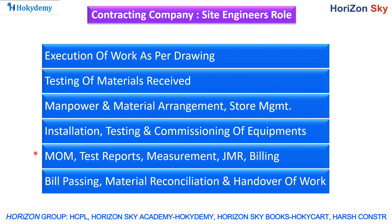The site engineer keeps up with billing as well. Billing is specific to the contract side — documenting what materials have been used to date, what equipment has been used, what services have been rendered. For example, a civil engineer's contracting company would document JCB usage hours and similar items.